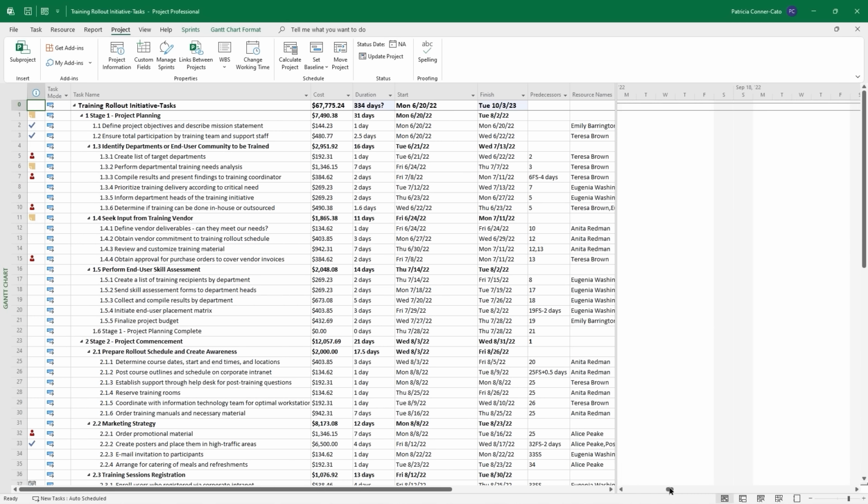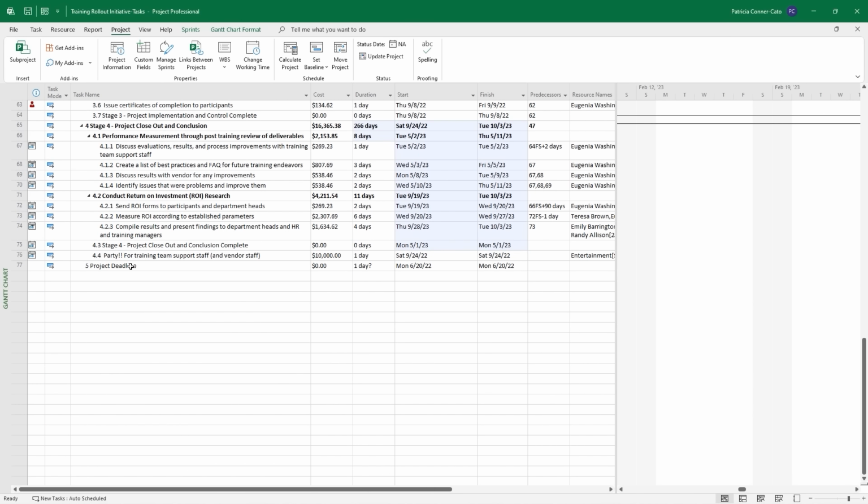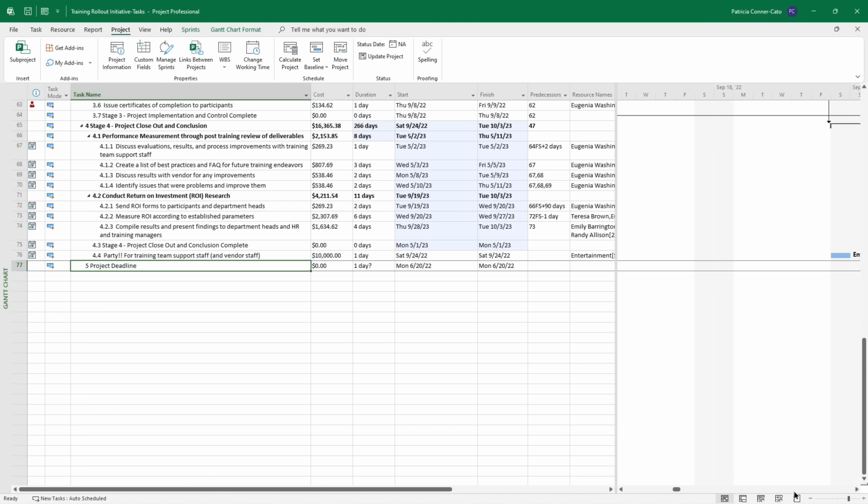And if I go to my deadline marker, which was set for February 28th of next year on the Gantt chart, let me get into February. Here we are, and then scroll down to the deadline task and scroll to it. So we can see at this point, we haven't gotten to that date yet, right? In reality, we haven't gotten to that date. We're just scrolling to it. But at this point, if that is going to be pushed out that far, we might want to consider updating our deadline and making a note about why we're updating it. So that deadline arrow is still fine for February 28th. It will flip to red on February 29th.